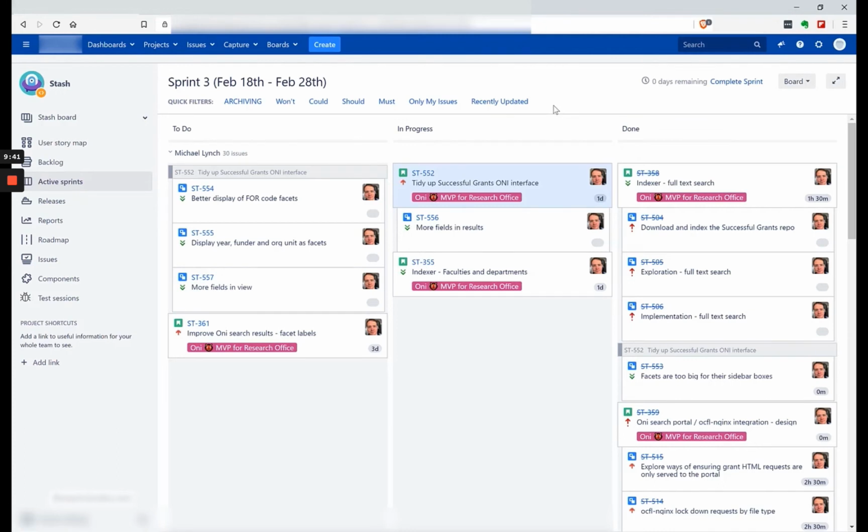But like I said before, in this project, we're doing fortnightly sprints. If there were, for example, 3 days left, then here you would see 3 days left. But because today is kind of like the last day, it's actually saying 0 days remaining, meaning that we're finishing and wrapping up the sprint. One of the things in Jira is that even though we might have actually completed the sprint, it doesn't automatically complete for you. You actually manually complete it, mark it complete.